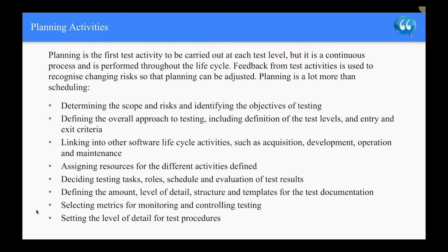Planning is a lot more than scheduling. It may also include determining the scope and risks and identifying the objectives of testing, defining the overall approach to testing, including definition of the test levels and entry and exit criteria, linking into other software lifecycle activities such as acquisition, development, operation, and maintenance, assigning resources for the different activities defined, deciding testing tasks, roles, schedule, and evaluation of test results.